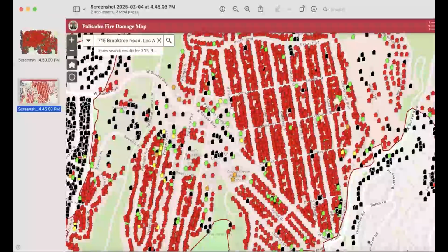We didn't talk about that too much today, but that's an important aspect of the recovery. There's a lot of work for architects. Most of the architects that I knew in my community only did drawings and said, I don't have time to do CA because I've got too much to do. And that was kind of where we ended up with some of these. We had some major fraud going on. So it's very important to be aware of that.